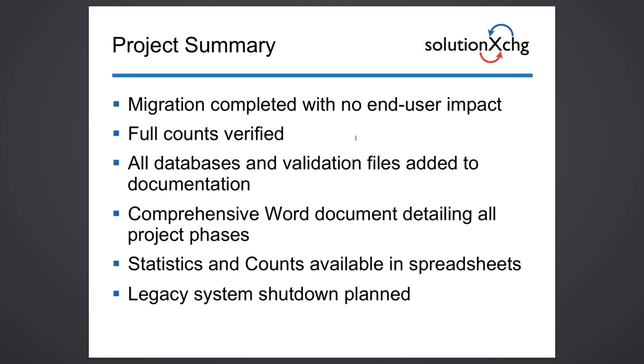So as a summary, migration completed with no end user impact. All counts are verified. All database and validation files have been added to the documentation. We created a comprehensive Word document detailing all the project phases, and statistics and counts are available in spreadsheets.